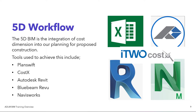With PlanSwift you can easily do your digital takeoff and pick your quantities. With Costex and Bluebeam Revu you can load in your 2D drawings — PDF, AutoCAD drawings, image drawings, and others — and pick quantities directly. Once you pick the quantities you can attach the cost to them, then apply that to your 3D model using Autodesk Revit and Navisworks. You extract the quantities, do your estimation, attach the costs, and then get the projected construction cost for that project, moving into cost management.